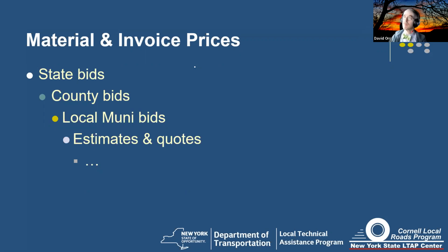I could go to RSMeans pricing or Dodge reports. Yep, they're available. A lot of people subscribe to them. A lot of them are available on the web these days. They're very good sources available for prices, and for construction jobs, they're very, very accurate and very useful. So that's one good place to go to get your pricing.